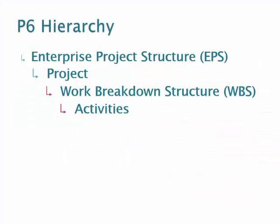In P6, there are four levels of basic hierarchy. Your initial level is the Enterprise Project Structure, the EPS. This is the highest level in your organizational project structure. This allows you to organize your projects based on how your organization is structured.